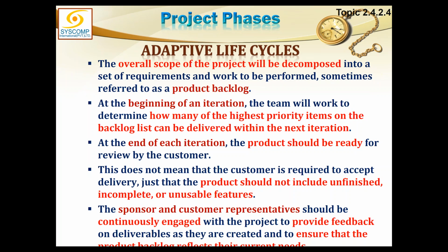What we do is, we try to clarify the scope sitting with the customer and try to convert the whole scope into small little requirements. Is it the requirement you want to be included? Is it the requirement you want to be included? So whatever is the clarity of the project at that point in time, we break it down not into work packages, not into activities, but into requirements. And we prioritize these requirements.